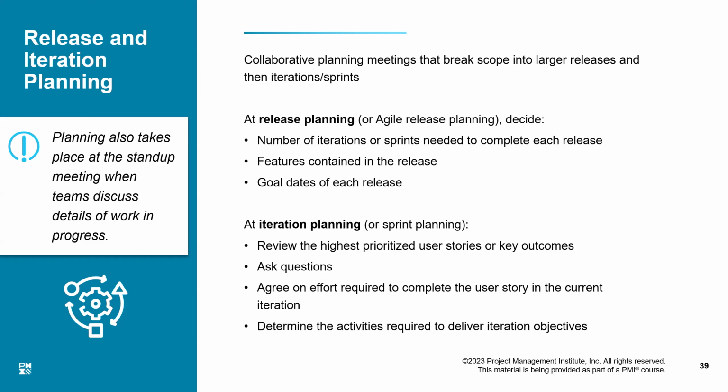You can't say that I have done the job in 1 week, so I can go home. You cannot, because your iteration is not yet complete. If you have done all the jobs you thought you would be able to do in this iteration, and you have done it early, that is no reason to close the project. We can go back to the product backlog and pick up some new user stories for the remaining part of the iteration which we are undergoing.